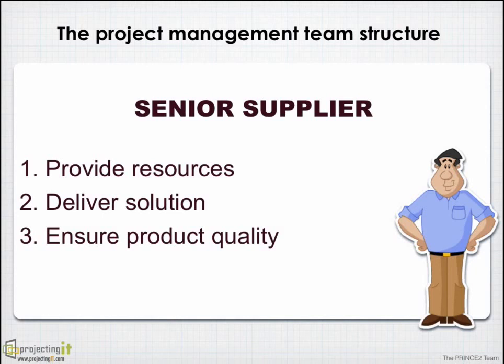Somebody who represents them and ensures that the contract terms are agreed and honored is someone who can become a senior supplier. Apart from that, I will also need developers and testers to build the application. Those who are going to bring me those resources are senior suppliers. For example, an account director for an IT company can become a senior supplier. In some cases, when the projects are done for internal customers by internal suppliers, I can have my internal team heads playing the role of senior supplier. They deliver the solution by ensuring that the right quality has been provided and the products are fit for purpose.